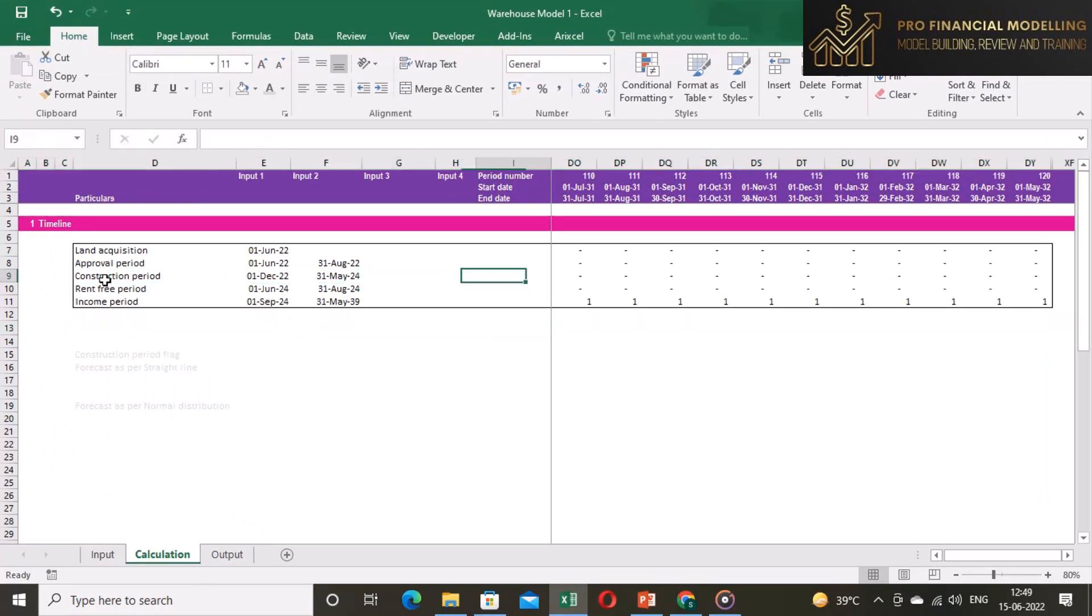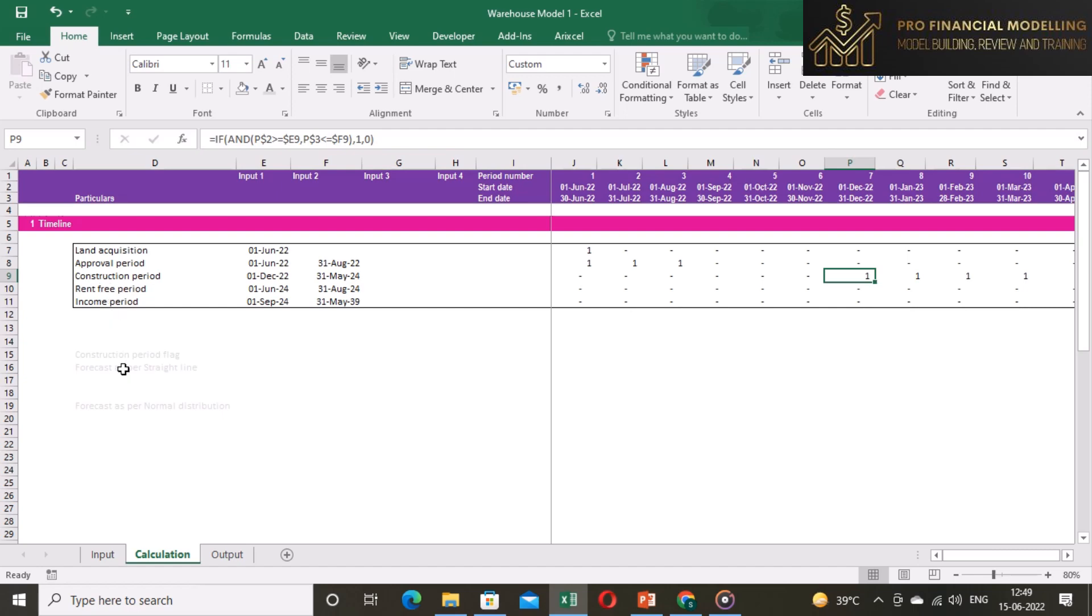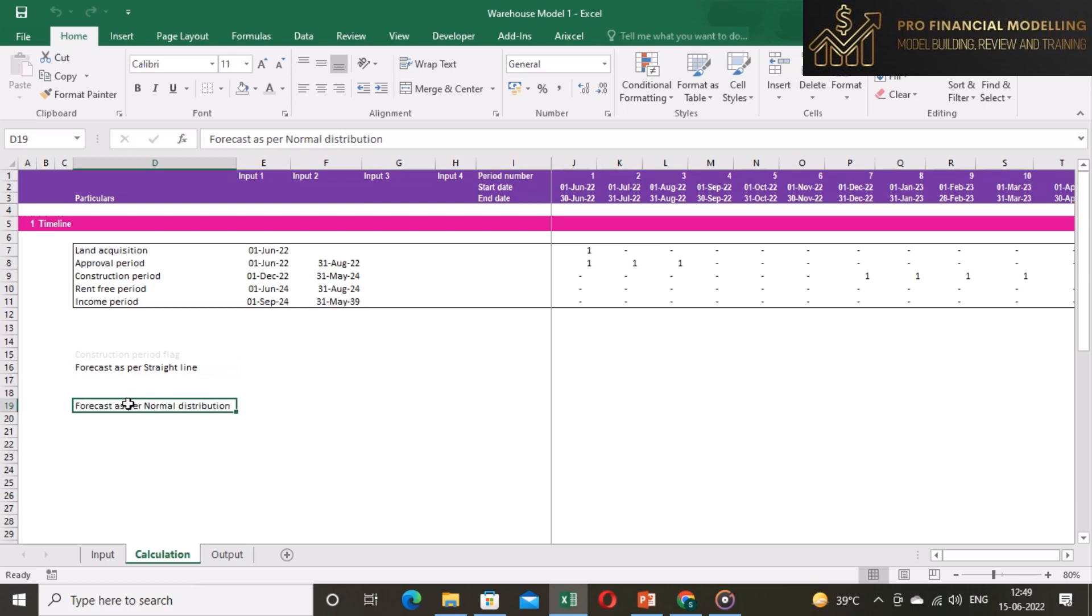We have our construction flag ready. This construction flag shows the construction period for developing the warehouse. There are two ways of forecasting the construction cost. First one is straight line assumption wherein we assume that cost will be equally split among the period. Second method of forecasting is as per normal distribution curve or S-curve.